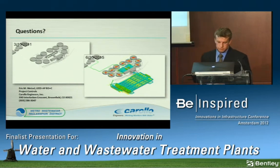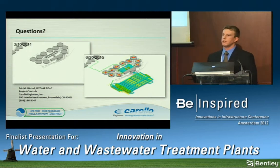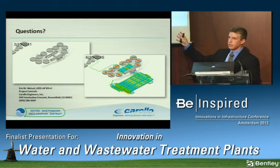Curious, were you doing interim as-built surveying to update the model, or were you kind of checking things off visually as they were completed, or what? Well, we have a cost-loaded and resource-loaded schedule. So as things are completed, they get actualized in the schedule. And what that does is it actualizes it in the model, too. So that exact date it finishes will be the exact date in the schedule.